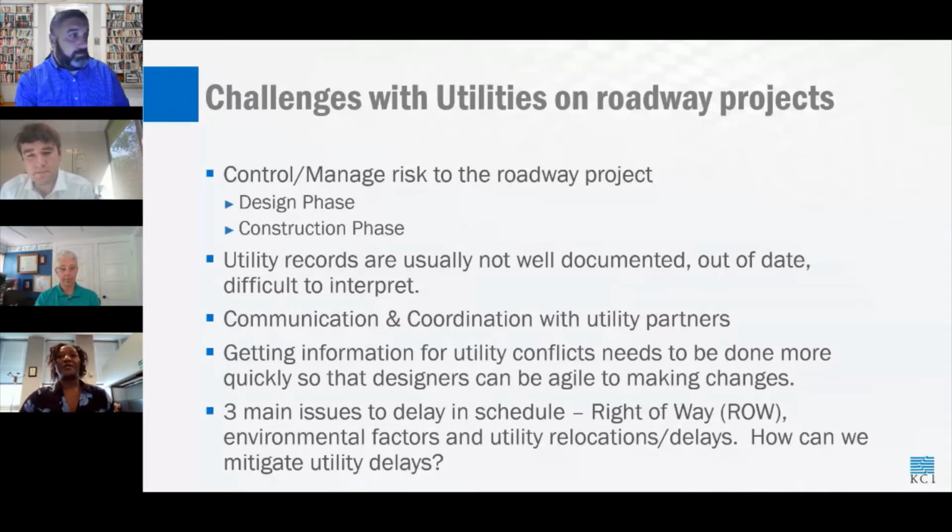When utility issues are not addressed during design, we run the risk of construction delays and increased construction costs. When there is a lack of communication and the project is too far along, there may not be enough time in the project schedule for the designers and or utility owners to reassess the utility conflicts and redesign. I've seen designers and project managers with the mindset that utilities can just relocate, mainly to maintain a schedule or reduce rework. And as a former designer, I was guilty of that mindset myself.